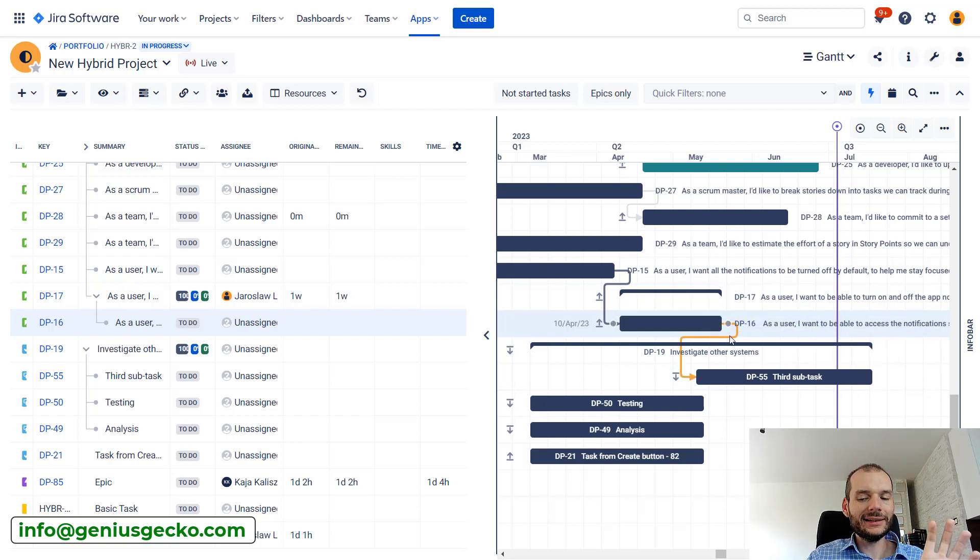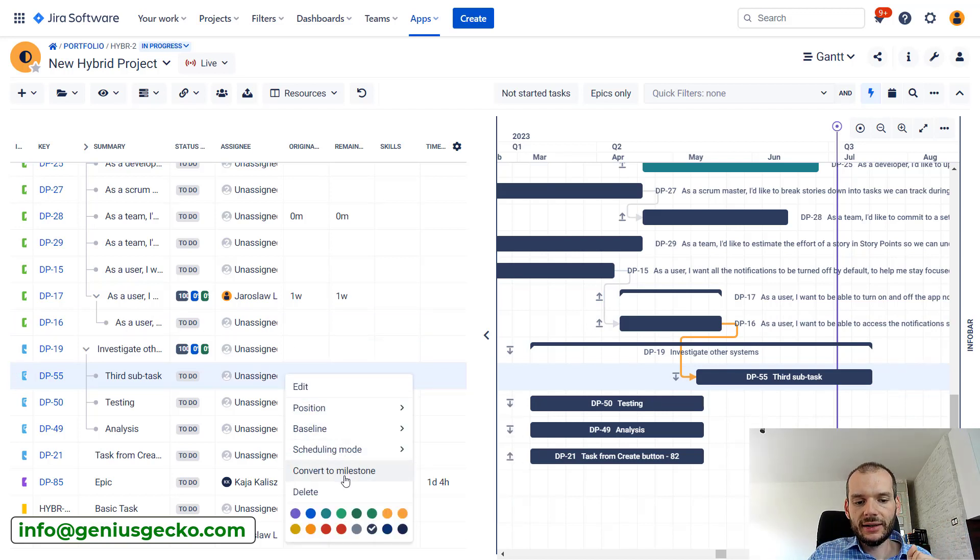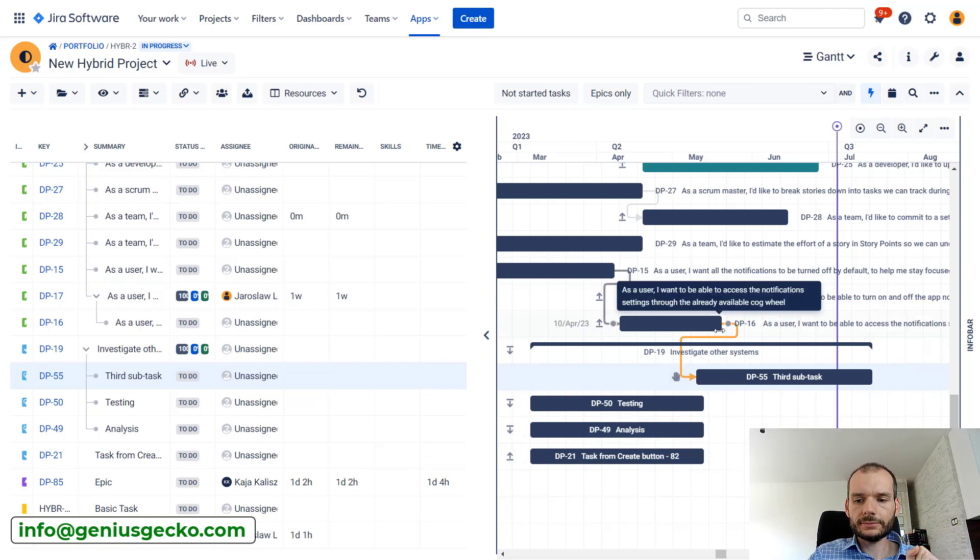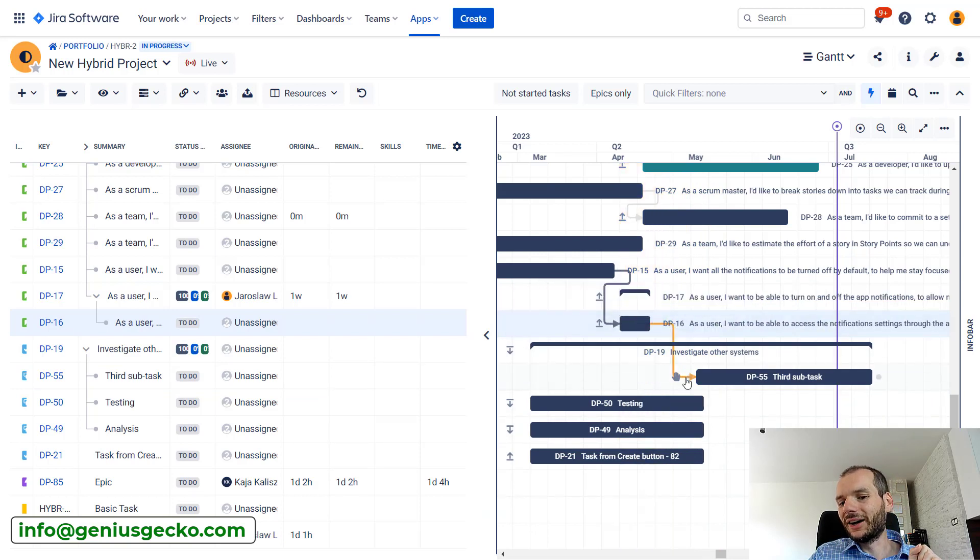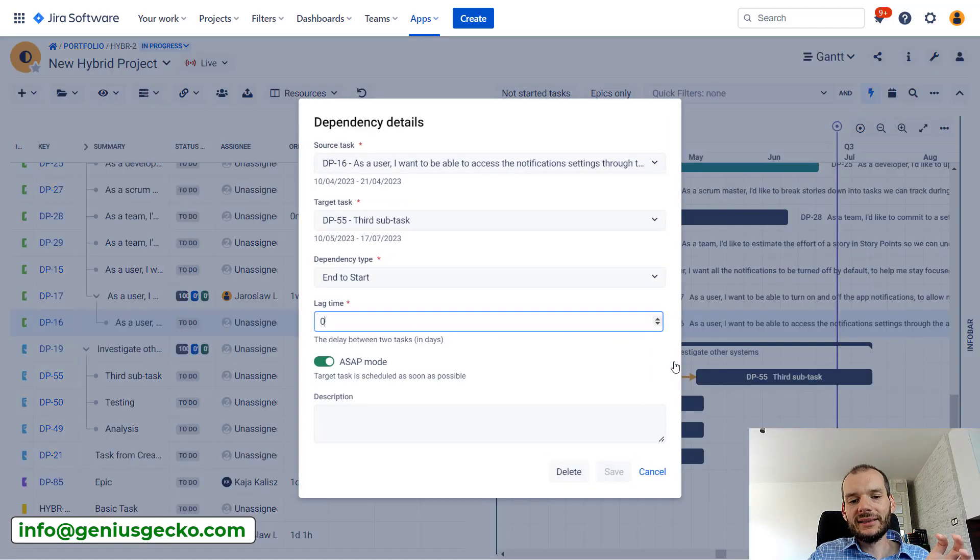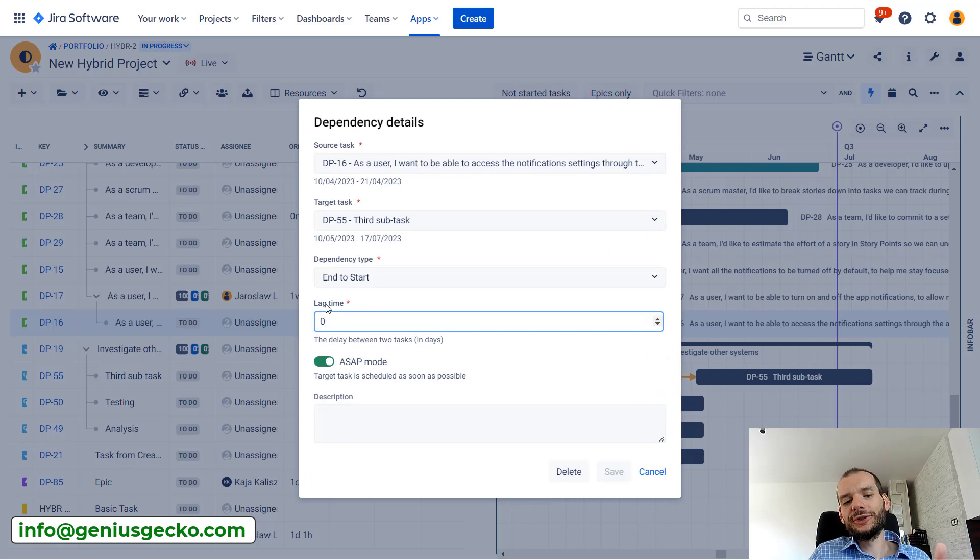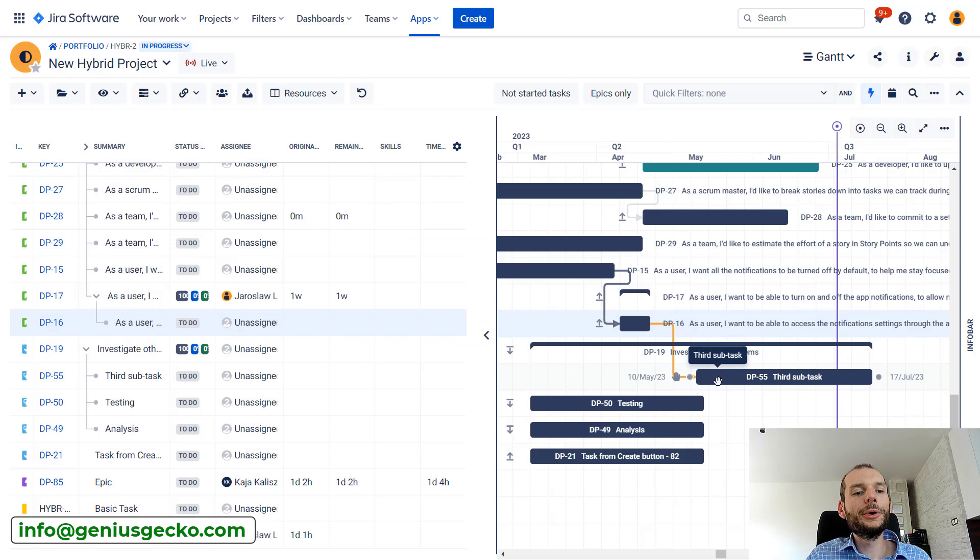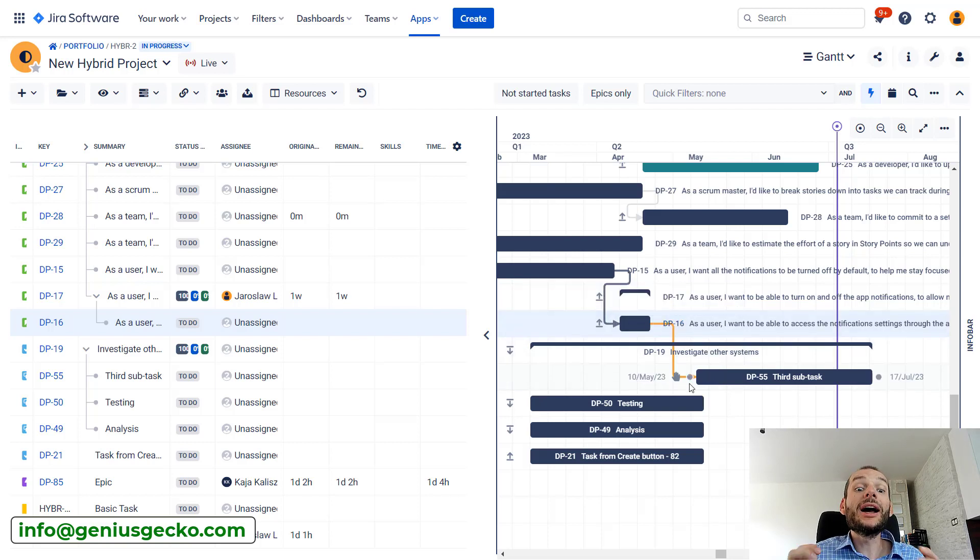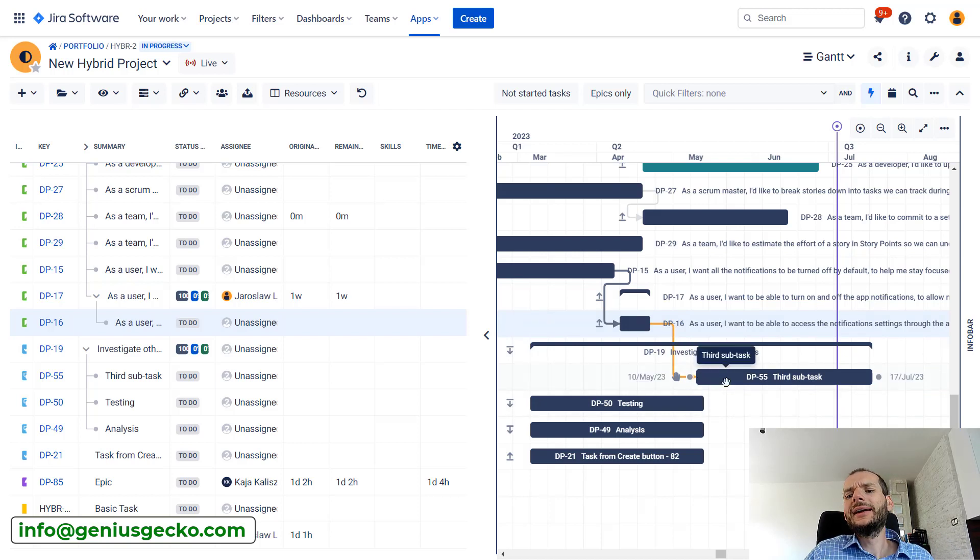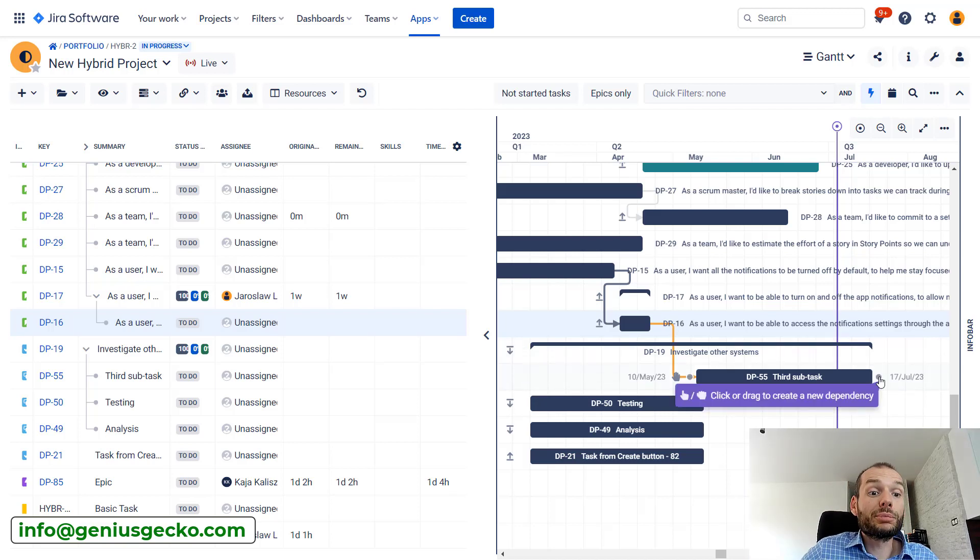The situation where dependency was not respected in the sense that the task that should be finished earlier before this one starts is not finished are one thing that can happen. The second thing is that there can be an unnecessary gap between two tasks. So if I put scheduling mode for a moment to manual, you can see that I can create an artificial gap between those two tasks. This also highlights my dependency in yellow. If I click, lag time is zero - there should be no gap between those two. But because the second task is in manual mode, Big Picture does not automatically move it. Because of that, you have an unnecessary gap.